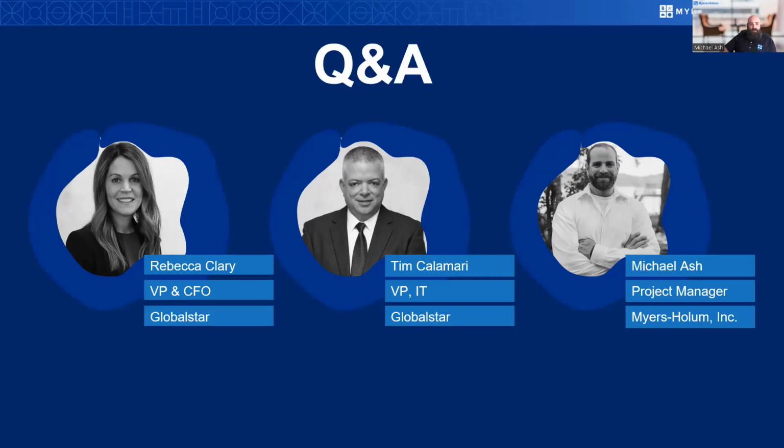And a big one from the MHI side is honestly expectation management. At the very beginning of the project, we need to ensure that we're setting the correct expectations for the client, for delivery, for everything from our methodology. We have a very specific methodology we use, which is proven successful. It works with a lot of different clients. It's just a matter of fine tuning a couple of different aspects of it, understanding how we're going to get to where we're going at the end of the project through discovery sessions, walkthrough sessions, testing sessions, data migration, and laying that groundwork so everyone understands where they need to be when, and they're able to forecast their availability, tying back into client engagement, right? We're able to forecast when additional support or a surge in support will be required. So yeah, I think those three things really set a solid foundation for everything else to fall into place and be successful.